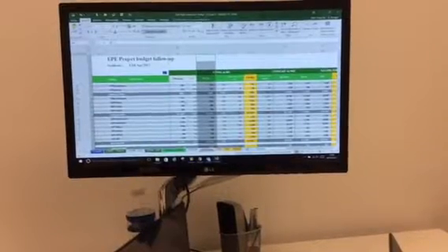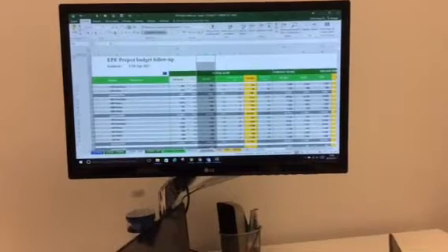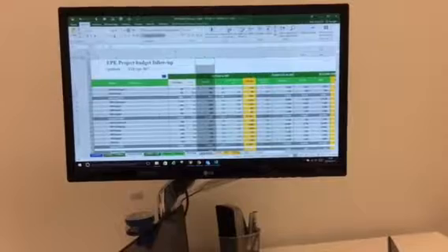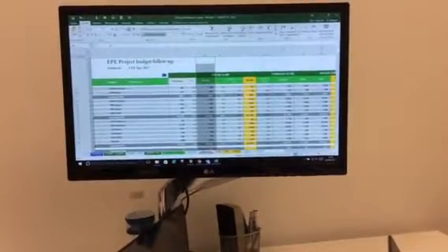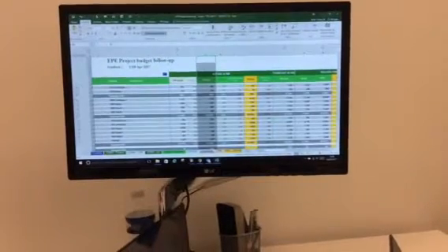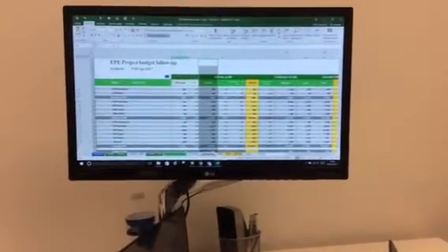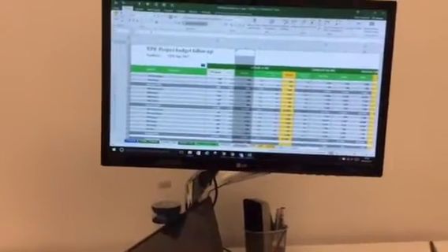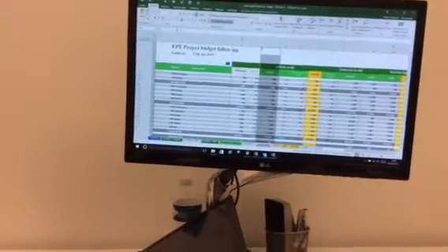Got it. So then we have this MS, and from the other side we have TT, time tracking. It's more or less the same thing, but it's about the actuals. So every month, each and every person will allocate hours on the project on which he spent time. And then we can see if the MS is more or less related to time tracking, forecast with actuals. Got it. So that's why here you try to check whether... So mention just one request. I'll let you go through your demonstration, but then I'll have to sit with you and map the process.